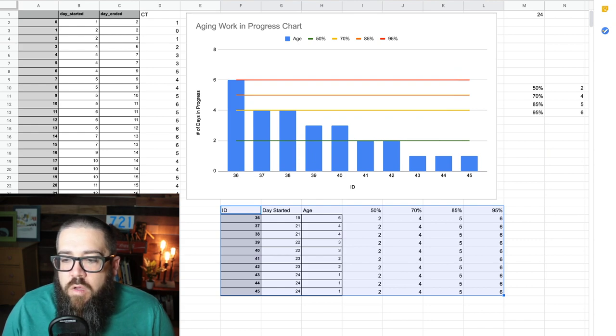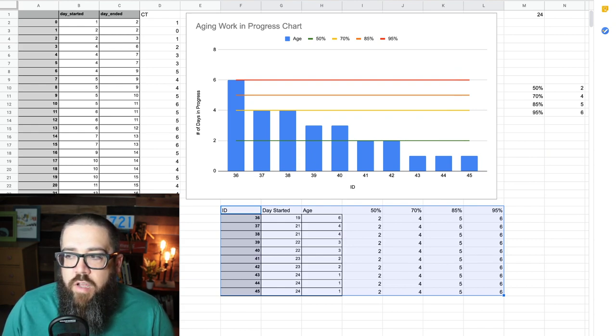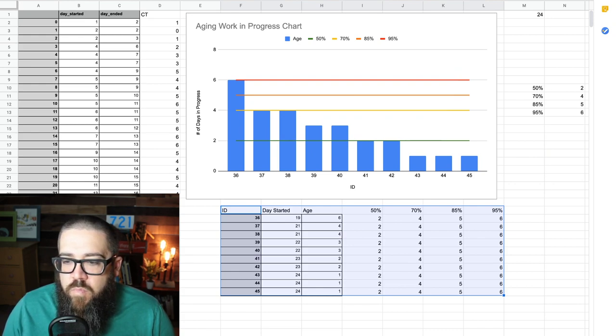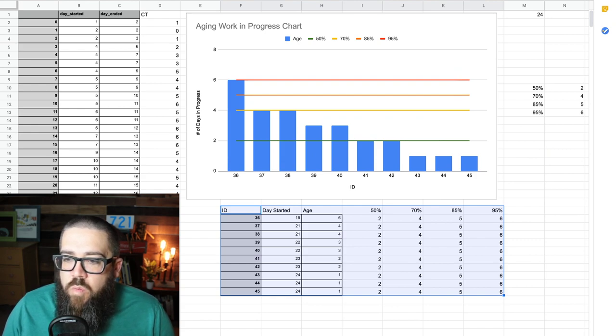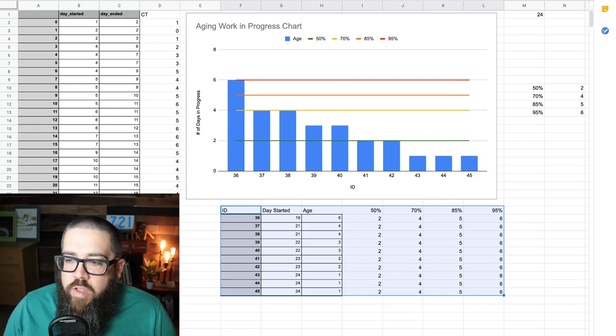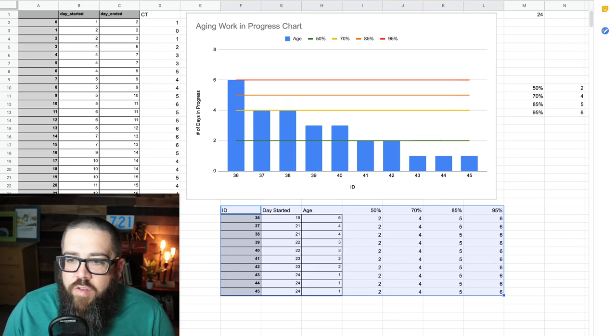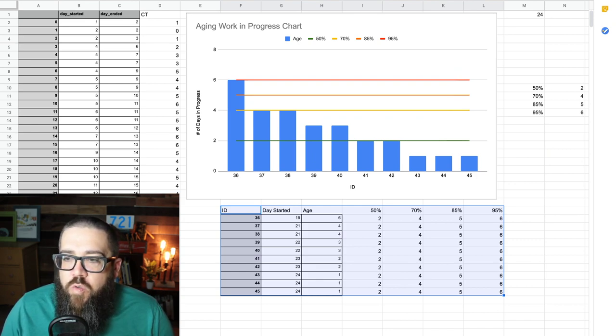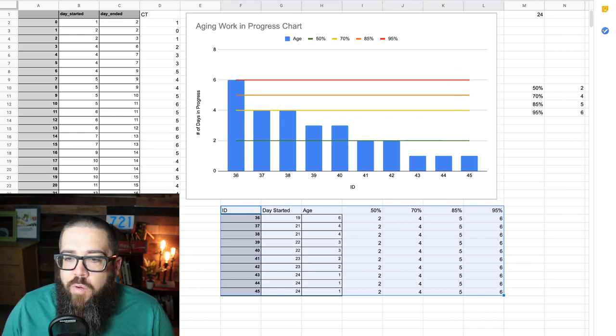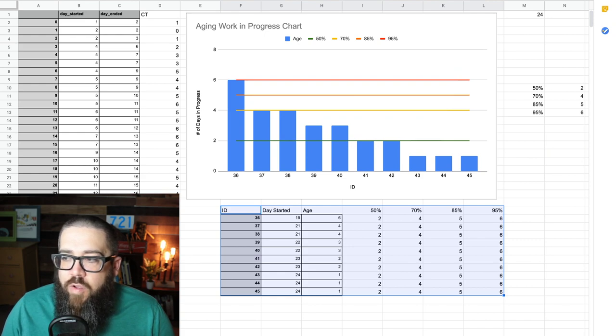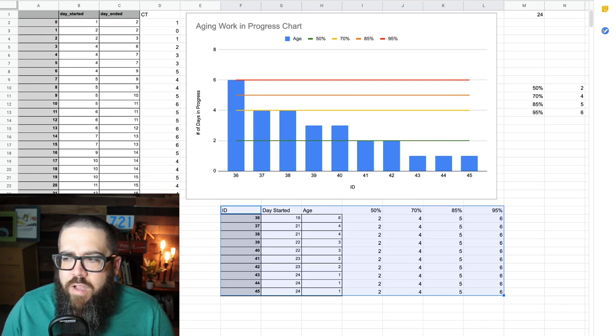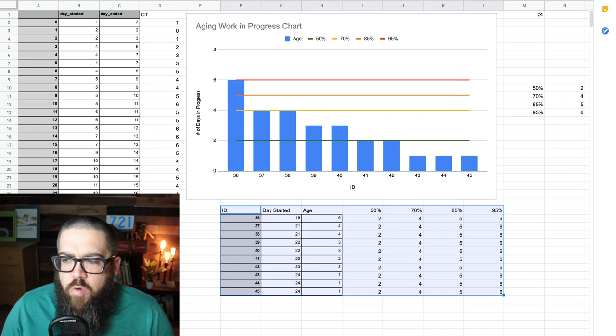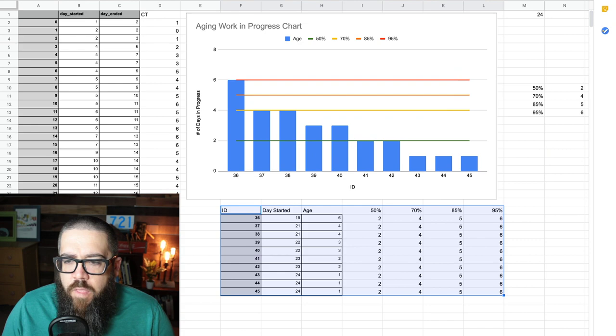So the oldest, which is the one that started on day 19, which is now six days old, day 25. So that'll get us to the blue bars. So let's just talk about the blue bars for a minute. And let's talk about if this was a real team, what was going on. If I'm in stand-up or team planning or I'm just walking the wall, and I'm looking at this and I'm like, hey guys, what happened to item 36? Six days old. It's older than a week. You've been working on this for over a week now, over a business week. What's going on?